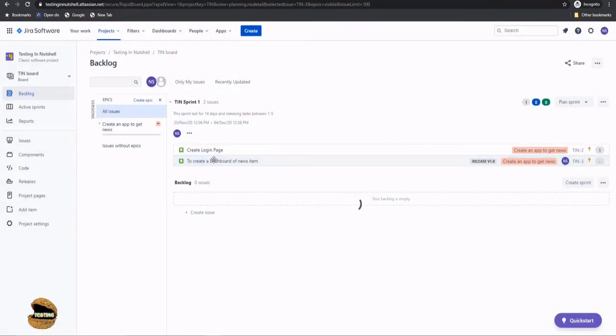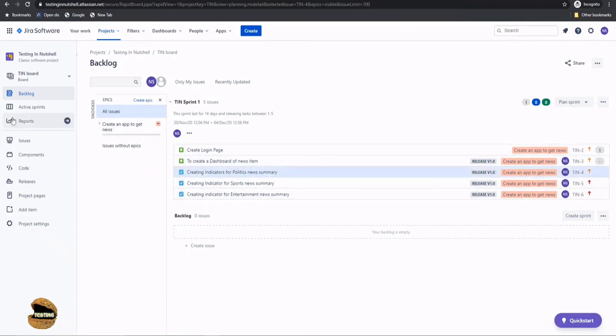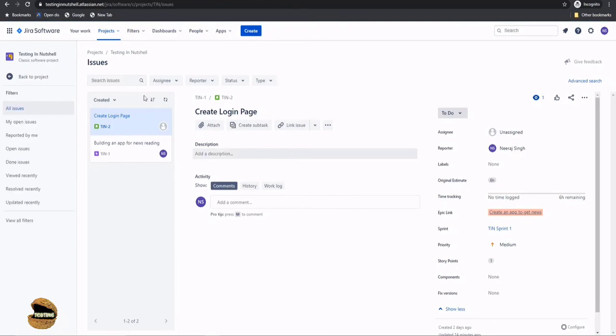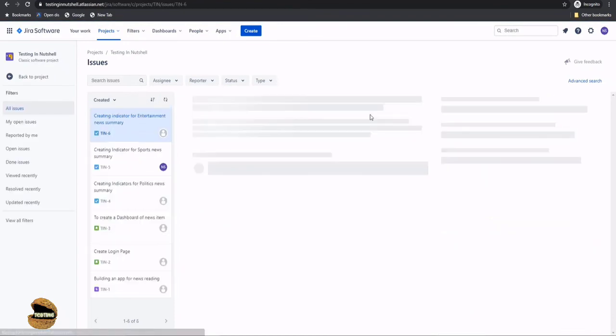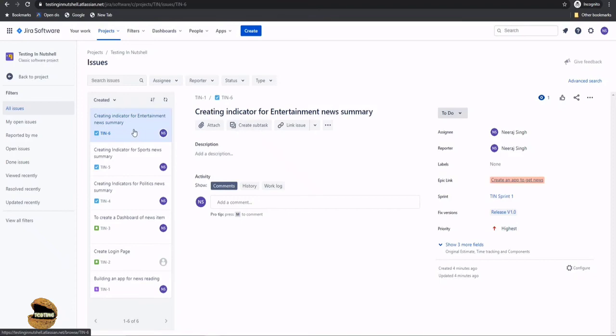So now you would see that I've got a few other tasks being listed here, and this includes different icons. So for epic we have a different icon, and for the user stories I have a different icon, and for the task I have the blue one. And you can always go to the issues section to see all your different issues put together, and we can definitely look forward to have more details. You can refresh it because generally by default it may not take, and now you can see how exactly you can find the details what you have mentioned. Don't forget, also we are talking about the create subtask here. You can always create a subtask if you think a task is quite bigger or you want to distribute among your team members in order to perform that activity.